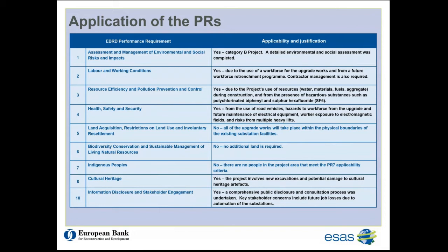In relation to PR7, Indigenous peoples, well, PR7 doesn't apply either because there are no people in the project area that meet the PR7 applicability criteria. Moving on to PR8, cultural heritage, well, PR8 does apply because the project involves new excavations and the potential damage to buried cultural heritage artefacts. PR8 also applies to this project due to the presence of some murals, which we will see in some photos coming up. And finally, PR10, information disclosure and stakeholder engagement.